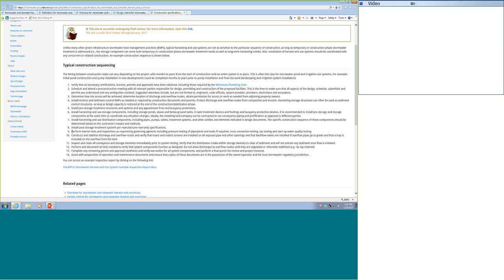All along you should be performing these interim tests and inspections to make sure that all the pieces are installed properly, and you're protecting your pipes and pumps before all of the treatment systems might be in place and operational.